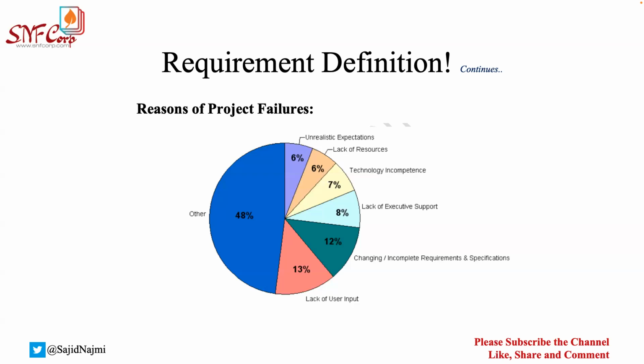For now, as a BA, if you are getting something in the middle of the work or the development, the first thing you will do is document this as a new change request, and you will do your analysis with the team, and you will give the customer the details, what will be the impact, and what will be like a ballpark effort. Probably you will not be able to give them the efforts. You will discuss with the finance or the developers or the project managers, and then probably you can go and let them know what could be the timeline, what could be the budget the customer may have to end up paying, and what could be the process you will be handling. And then once the customer approves, you will go through the change management process internally, and then you will take it forward. Now, what are those? We'll discuss some other time.